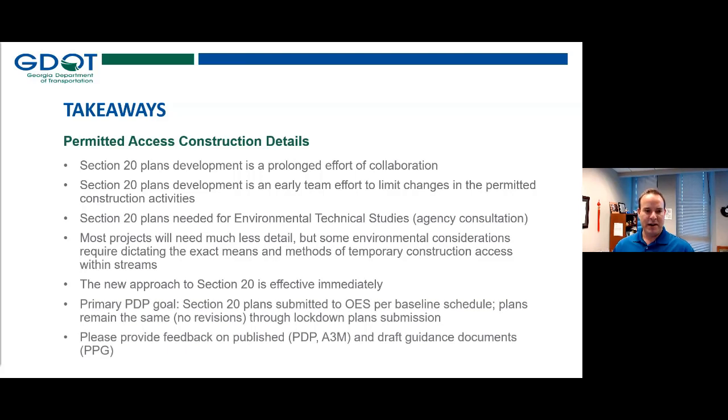And again, the primary PDP goal here is to submit those on baseline schedule, the Section 20 plans to environmental, and have them not be revised through lockdown plan submission. And again, a reminder to please give us feedback on any guidance that's currently published and the draft guidance that we'll provide after this presentation.